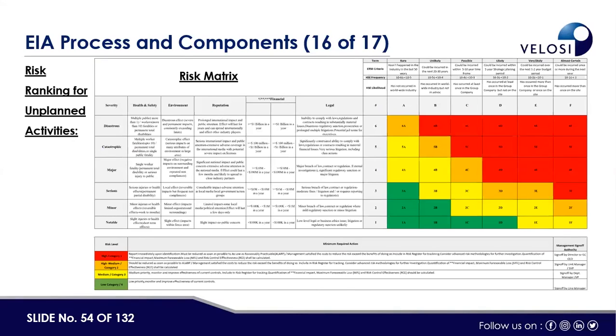Basically, as we mentioned, if it's an existing facility and any additional structure is going to be developed, then the screening will determine whether there is any discharge to the environment. If there are no changes in the physical environment or the biological environment, then EIA is not required. But if that additional platform is releasing some discharges to the environment, then definitely an environmental impact assessment will be required.